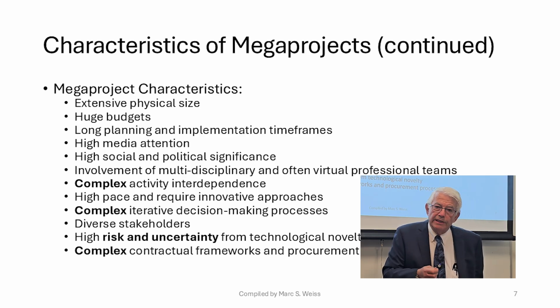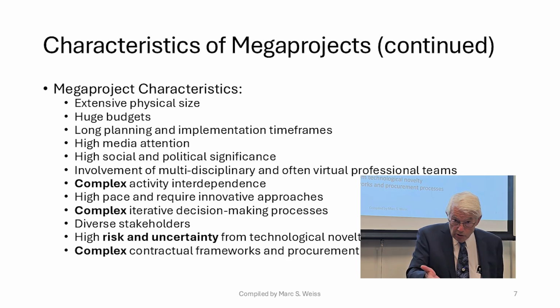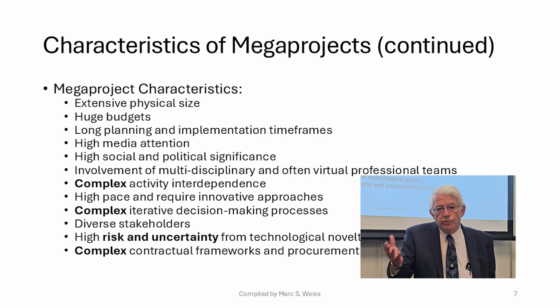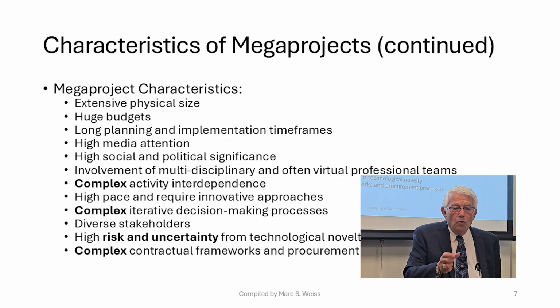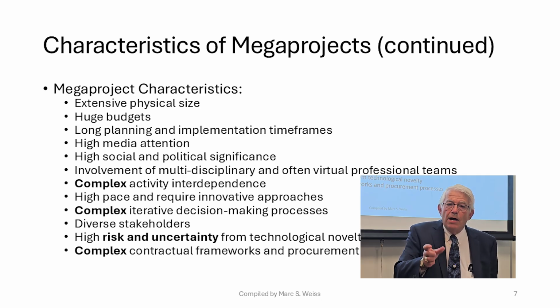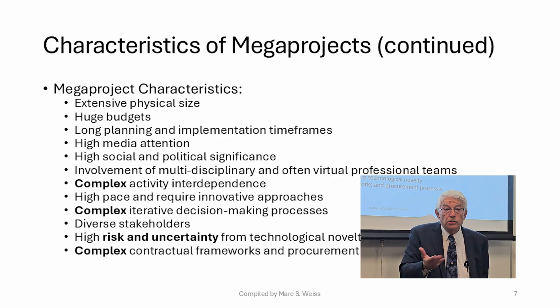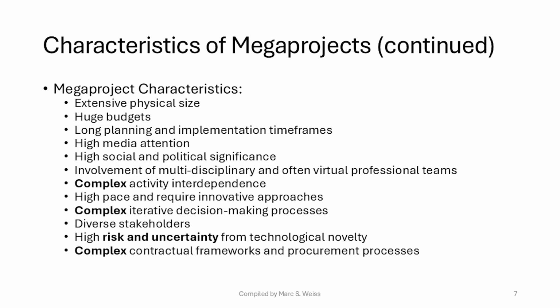All projects have risks, and in traditional PMBOK procedures or methodologies, we have risk management. We predict the outcome of something we could identify beforehand. So for example, if I have a factory, what's the probability that my factory is going to go on strike? That's a risk. And then what we do is we come up with a risk management mitigation plan. If my factory goes on strike, what's my mitigation plan? What am I going to do? All projects, including mega projects, have risks.